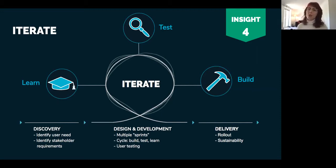So Elle, could you just talk us through that typical sprint process, and how you coordinate the activities to get to a product? Yeah, sure. So on most of our products, we'll start with a discovery phase, which can take a variety of different turns, but normally involves in-depth interviews and finding out about the problem, doing focus groups and that kind of thing. But the key is just to identify what it actually is that we're trying to solve.